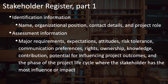Their communication preferences are an important connection between stakeholders and communications management. Each stakeholder will have different preferences regarding communication — some will respond better to email, some to text messages, phone calls, or face-to-face meetings. Those communication preferences should be recorded in the stakeholder register. Stakeholders may also have certain legal or moral rights, such as occupational health and safety, rights protected by legislation, or rights to protect historical sites or the environment.